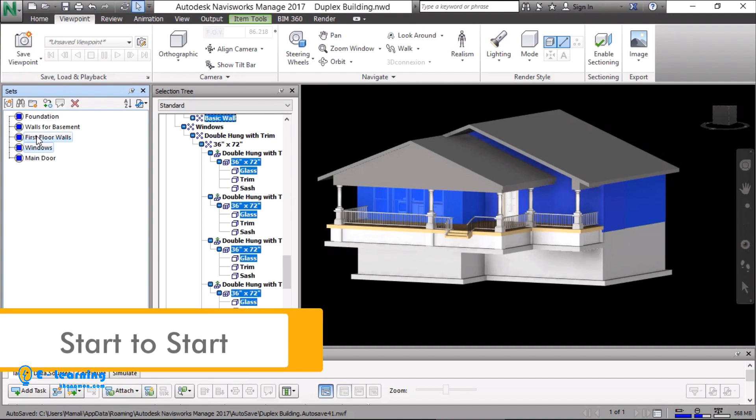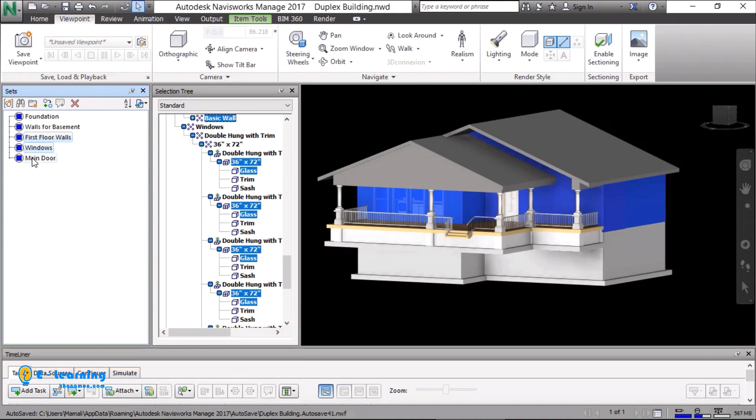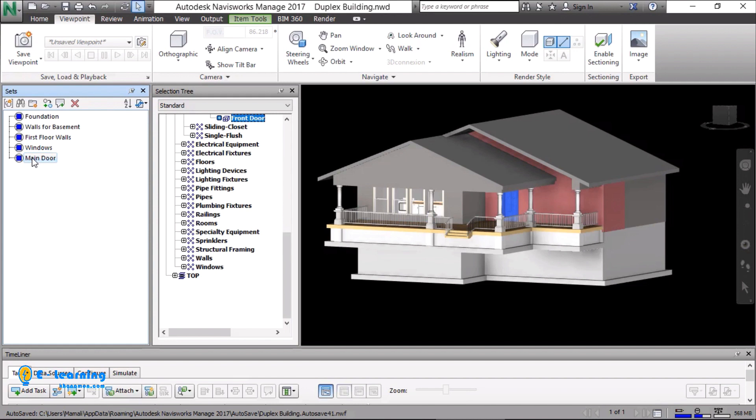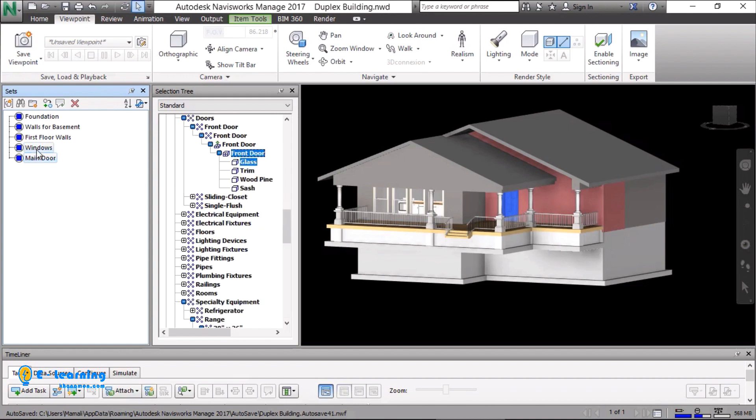Start to start: When we start to install the doors, we can start to install the windows simultaneously.